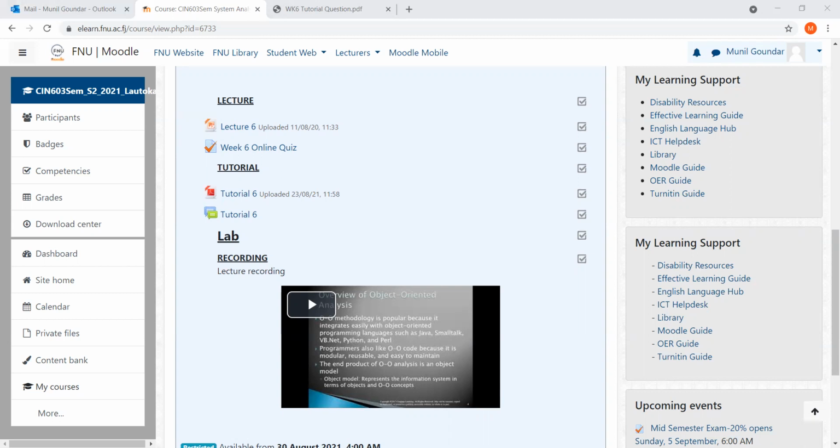So, it starts on the 2nd of July. That means the finish date is going to be start plus 3. It starts on the 2nd, so the 2nd is included: 2nd, 3rd, and 4th. That means it finishes on the 4th of July. You'll notice that 4 minus 2 gives you 2, but please do note that it starts on the 2nd, so you have to include the 2nd as well. 2nd, 3rd, and 4th gives you 3 days. So your next activity starts on the 5th of July.